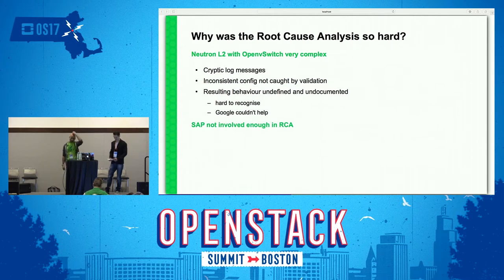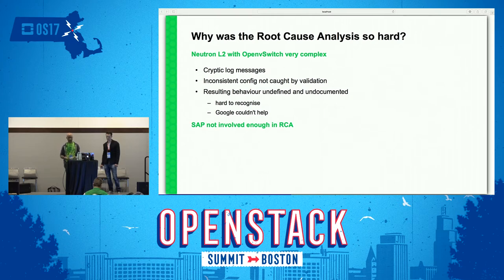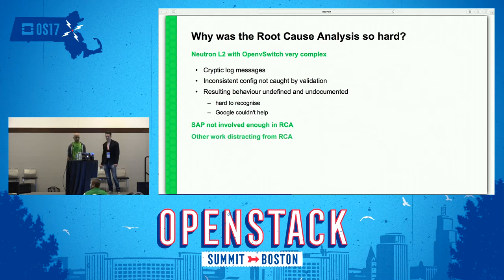Why did it take so long to figure out? Neutron L2, especially with Open vSwitch, is just a really complicated beast with hundreds or thousands of log messages requiring expert knowledge. The other mistake, in hindsight from the SUSE side, was not involving SAP enough in the ongoing investigations — they had great knowledge about exactly what happened during the maintenance window. And of course, everyone had other responsibilities competing for their time.